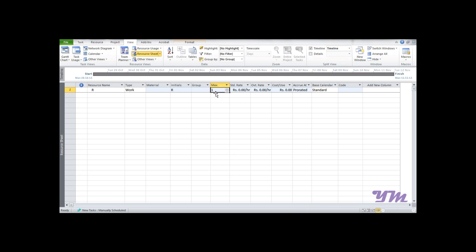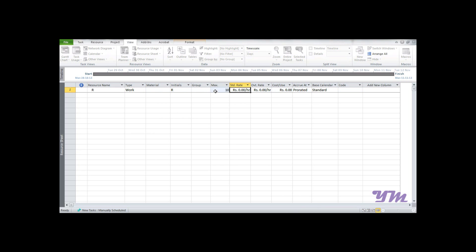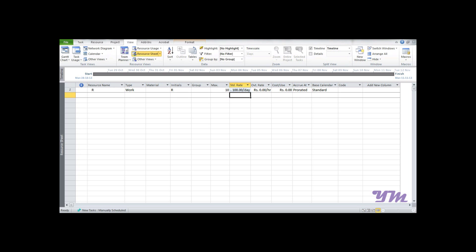Now we have it as a decimal value. Say we have a maximum of 10 units of resource R. For standard rate, you can see it's represented as rate per hour. If you want to change it per day, say the rate is 100 rupees, type 100/d so it converts to per day mode. This is how you add a resource - as many as you want.